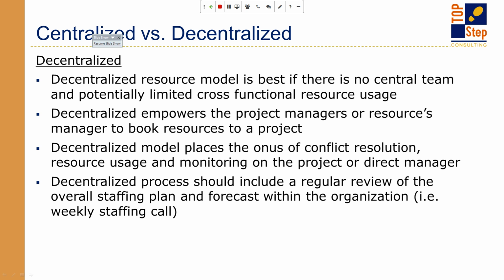So for example, if a resource has some upcoming PTO that maybe they've mentioned to their manager, but it hasn't been formally requested through a schedule request, so it's not showing up in the system, the resources manager will know that. No one else would know that. If a resource is feeling sick and they let you know via email, hey, I'm not feeling great, you understand that that person may need some adjustment to their scheduling.